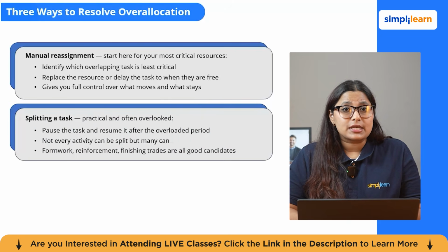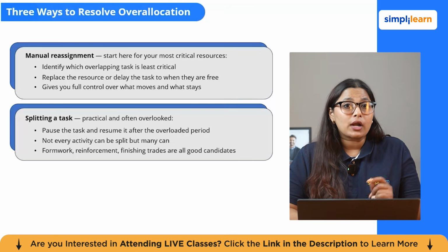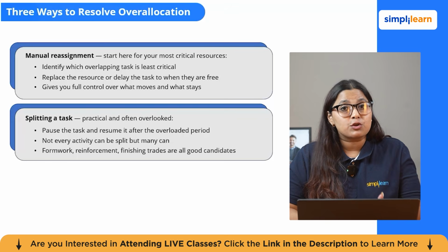The second approach is splitting the task. If a task can be interrupted, paused, and resumed, you can split it so that the first part runs before the overloaded period and the second part resumes after.